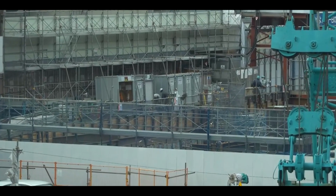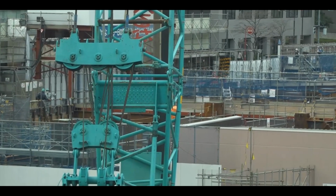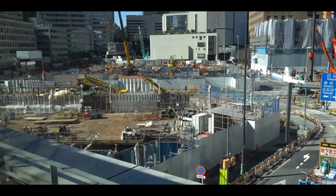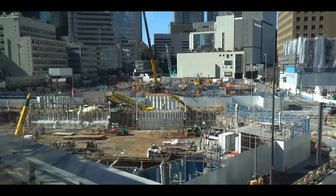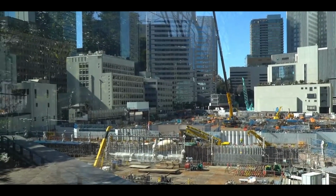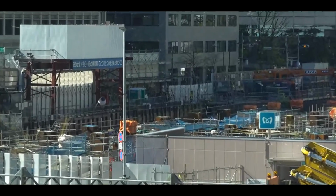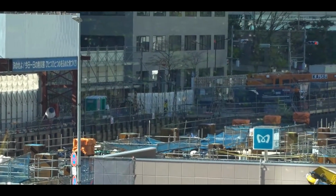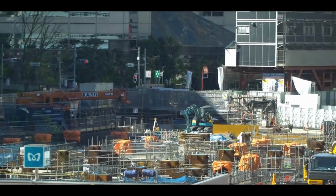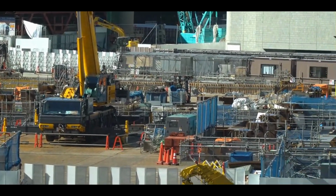To shorten the construction schedule, the top-down method was used. External basement walls and columns were installed first, and then excavation progressed downward while structural elements were built from the ground floor down. Column sizes and rebar arrangements were standardized. Rails and struts supported H-pile walls, and the SPS method was used to combine H-piles with lagging plates. This reduced stress imbalances during demolition and allowed simultaneous above-ground and underground work.